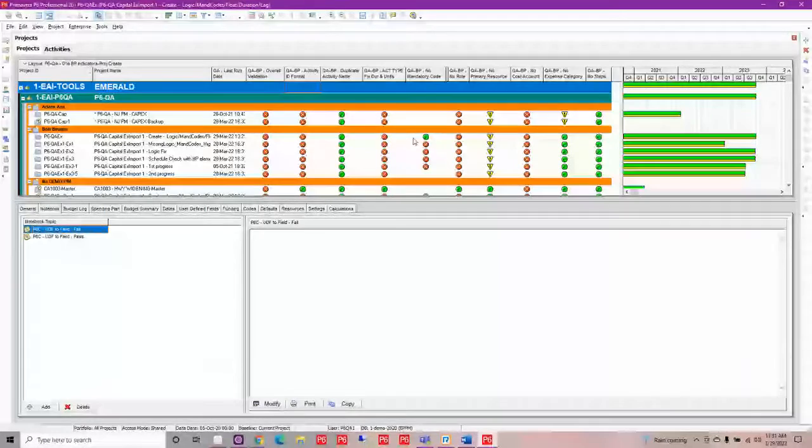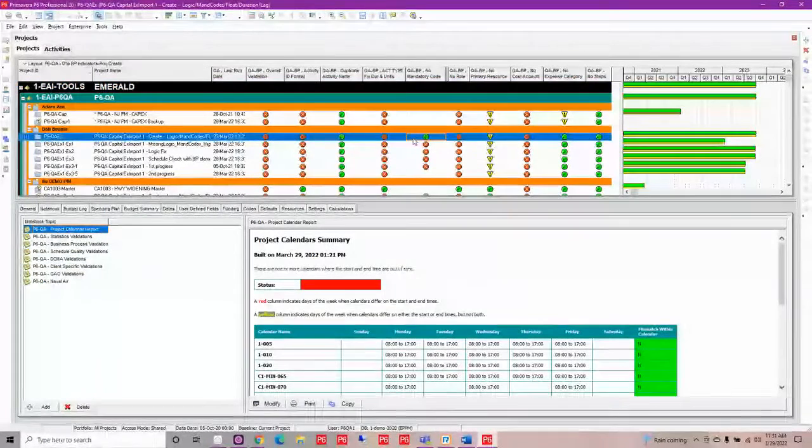We can also set mandatory codes. To a lot of our clients, this is pretty important. They have certain standards, for their corporate reporting or what have you, that there are mandatory codes that must be filled in. We can flag those mandatory codes and report on whether or not they are actually assigned. So it looks like we're doing pretty good on our mandatory codes here.